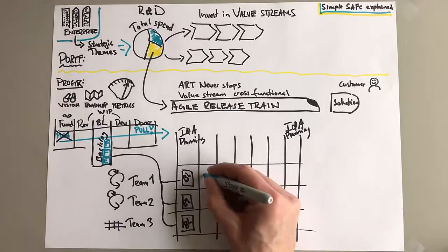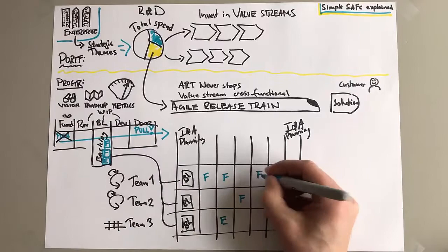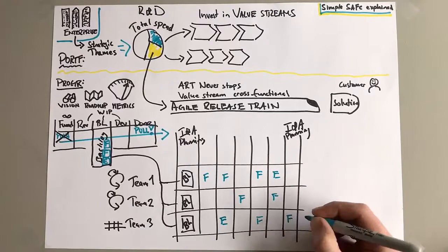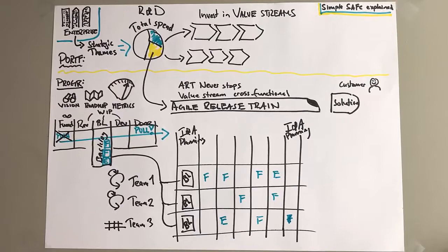So now during the planning, these three teams that we have in our example, they are planning out when they're going to deliver features. You could also look at user stories here, depending how big your features are. How big are your features? Well, if they're too big - hey, someone planned a feature in the last sprint? You don't do that.